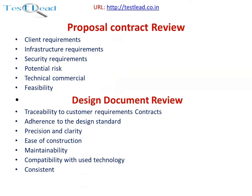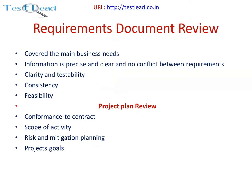Design document review covers traceability to customer requirements and contracts, adherence to design standards, precision and clarity, ease of construction, maintainability, capability, compatibility with the technology used, and consistent requirements.